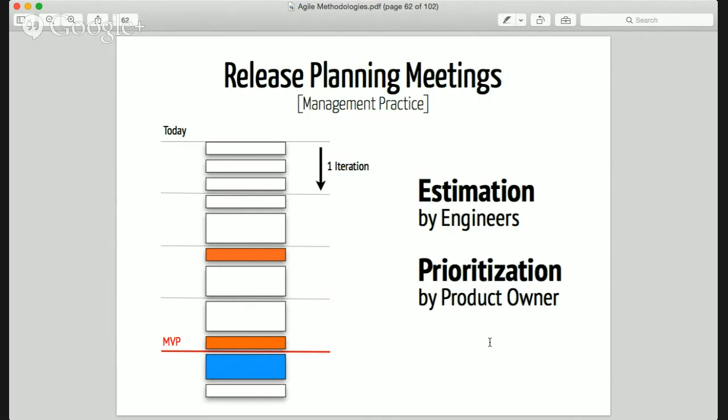So what happens is that engineers take a user story, that means a feature that you want implemented. I have a feature that I want implemented, then the engineers know how to do it. They're going to say, okay, for that feature, you need me to build a screwdriver, it's going to take me 1 week. Or you want a knife, it's going to cost you 2 days. So they're going to give estimations of how much time it takes to build a feature. You will all have to practice this as well, because you have to document your project's development to your peers. So estimate how long it takes for you to build a certain feature. The engineer does that.